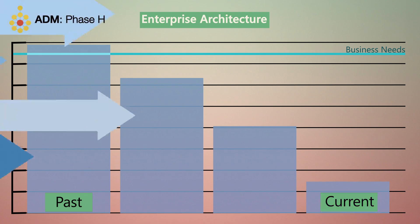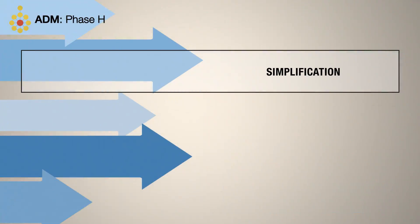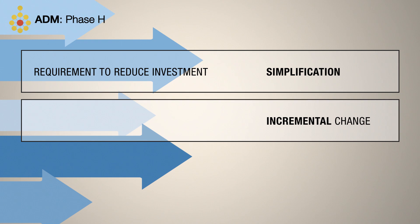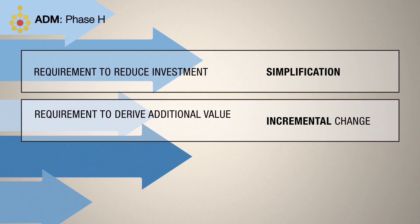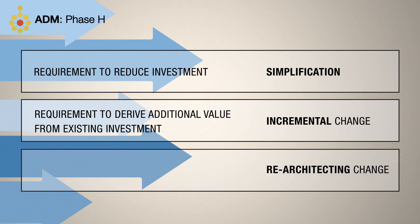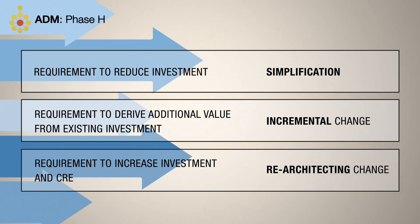Change requests output from Phase H can be classified as simplification, often driven by a requirement to reduce investment; incremental change, driven by a requirement to derive additional value from existing investment; or re-architecting change, which is driven by a requirement to increase investment and create new value.